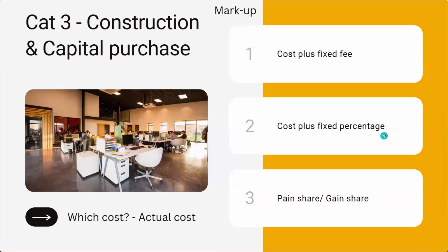With cost plus, it is often used in construction, where we pay the supplier the total cost they undertake in the project plus some amount equal to their markup. So we have a few arrangements here, like cost plus fixed fee. Like I agree to pay my supplier $1 million plus $100,000 for their markup. Or we can have the cost plus fixed percentage.